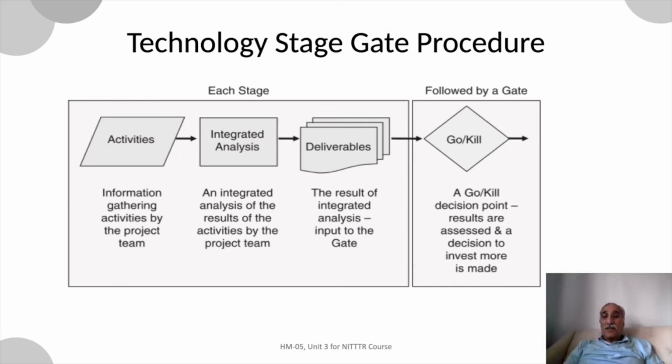So this decision gate is definitely the crucial gate where all the investment that has been made in terms of the human power, in terms of the time, in terms of the energy, in terms of the resources, can either go into production scale or has to be scuttled and killed so that future losses are prevented.